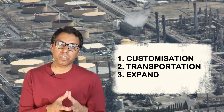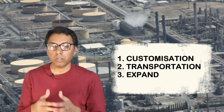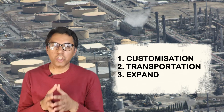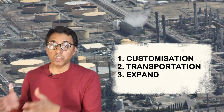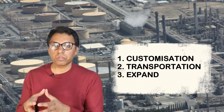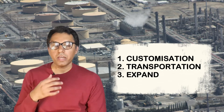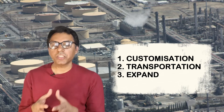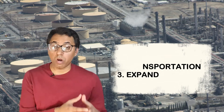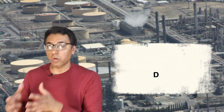Number two benefit of on-site fabrication is transportation. Traditional on-site work is performed piece by piece or spool by spool, so there is no need to transport large modules. Movement of large modules is especially difficult if the site is around an urban area. Number three benefit is expansion — it is much easier to expand or adjust the work to meet the project requirements.